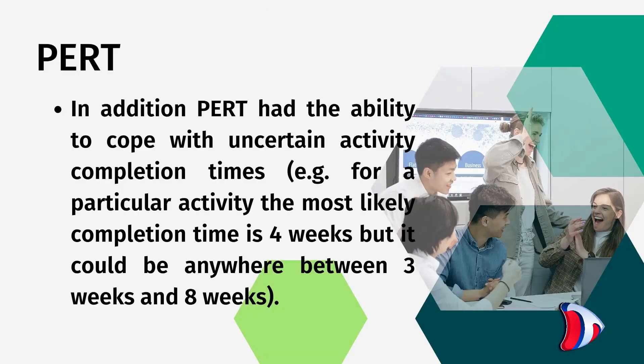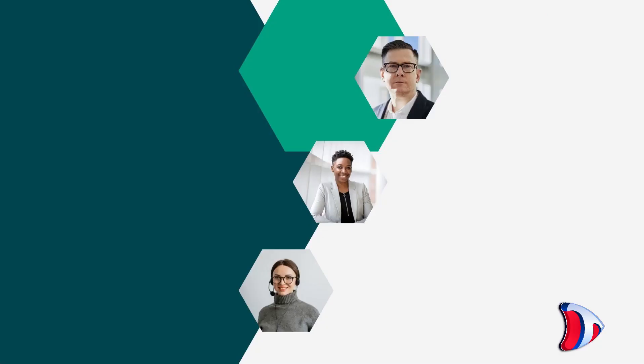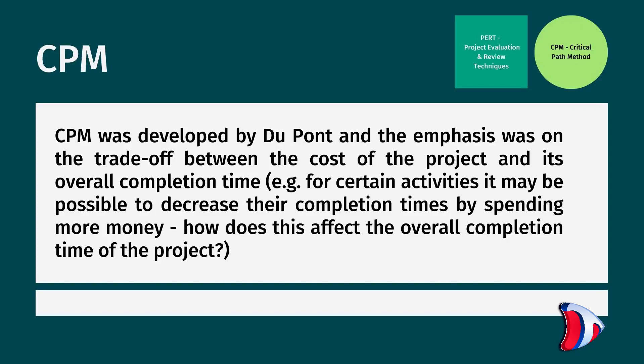In addition, PERT had the ability to cope with uncertain activity completion times. For example, for a particular activity the most likely completion time is four weeks, but it could be anywhere between three weeks and eight weeks. CPM was developed by DuPont and the emphasis was on